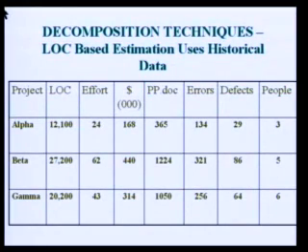The first project is named Alpha, and it has 12,100 lines of code. The effort is 24, so 24 person-months have been used. Effort means 24 person-months, and person-months means one person used for 24 months in this project. That is what it means, whatever you indicate in your effort. Then how much did it cost? $168,000.